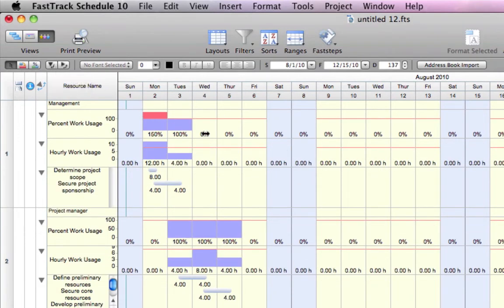Expand resource rows to clearly identify resource workloads, over or under allocations, and assign tasks.